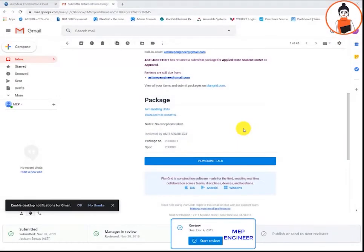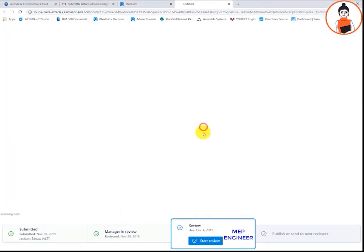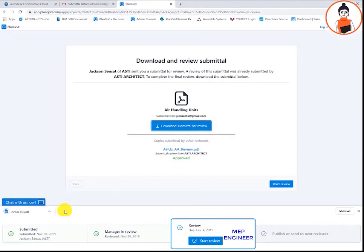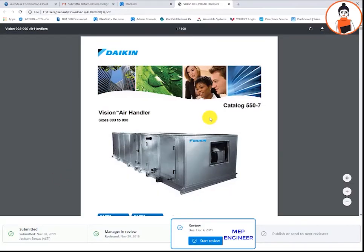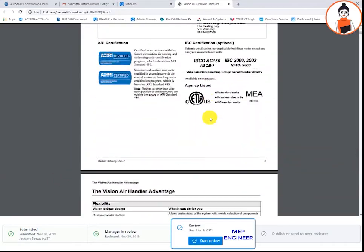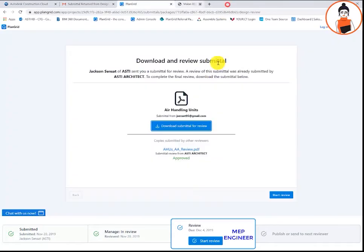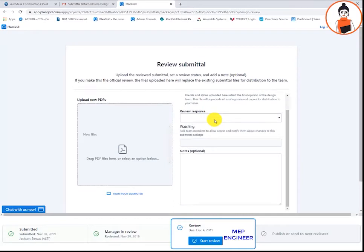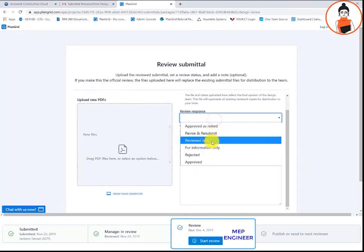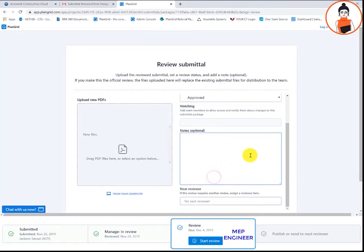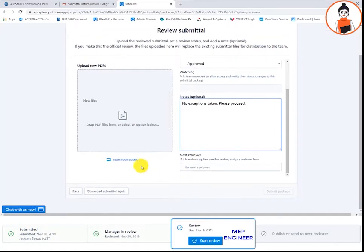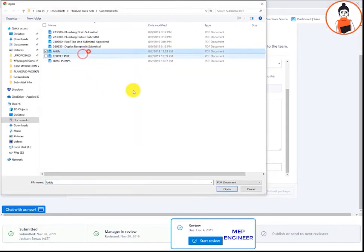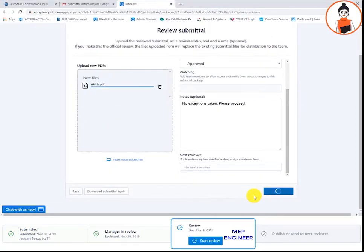The second reviewer also receives an email. Again, the reviewers do not have to have a PlanGrid license to be able to review these submittals. All items in this submittal are per spec in the mechanical schedule. This is an easy approval for me. The second reviewer can decide whether or not their response is the official response and mark it as approved or any other options. They are also able to add notes and any additional marked up PDFs. If they have another reviewer that they would like to include, they can select next reviewer and add an email address.